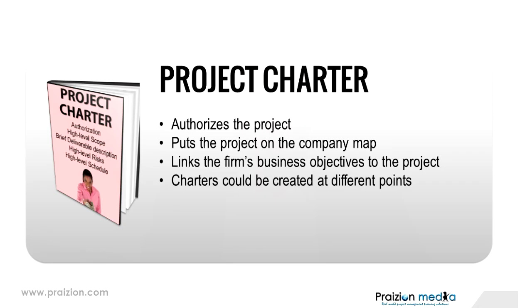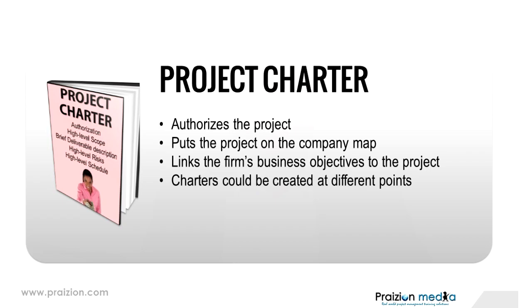What good is it going to do for the firm? The project charter will help us understand that. Bear in mind that this process, developing the project charter, could actually be carried out at various points on the project. These points could be, for example, at the beginning of phases, or some other predefined points. So bear that in mind.